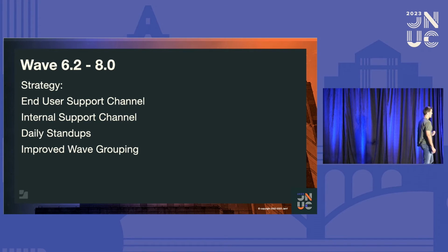We also realized we should probably exclude our users who are on PTO. Nothing is great than having a paternity leave and you come back, you miss an email that was sent 2 months ago about Jamf Connect, restart your device, and locked out. That also helped us out in reporting because our numbers were shooting up because all of these people are not connecting in with Jamf Connect. Well, they're out. They're not going to, right?